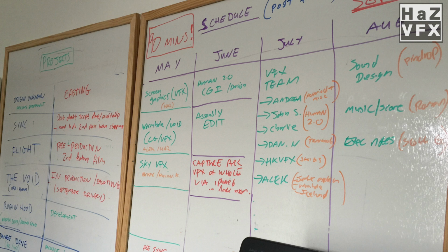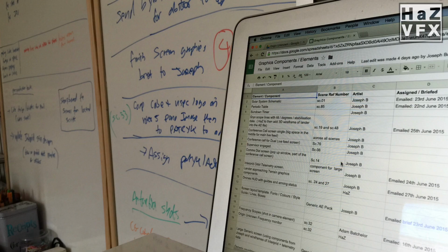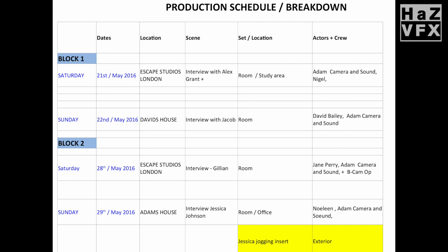In this class, I'm going to briefly touch on how the scheduling and budgeting were done for The Beyond, the two producing tasks which are constant core things that drive the production throughout. When scheduling the shoot, it's important to break it down into blocks of dependence. And a big dependent on The Beyond was the locations I wanted to shoot in, and the availability along with access we had, coupled with restrictions such as time we had as part of the location deal we made.